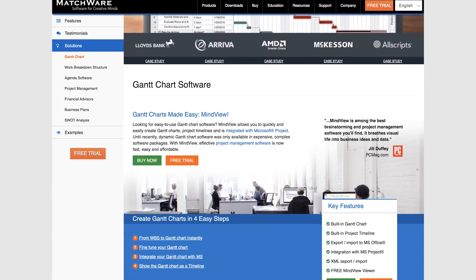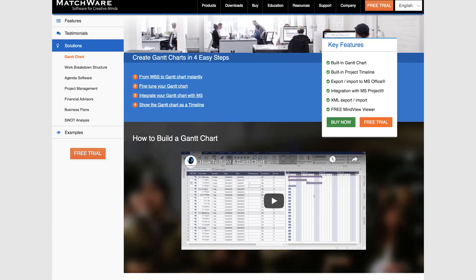Ninth is MindView. MindView is a powerful Microsoft Project alternative that boasts mind mapping features for project planning. With MindView, users have the ability to create a work breakdown structure, project timelines, and roadmaps, all without having to recreate data. Users can start by brainstorming project plans in the mind mapping view, adding scheduled information, and then switch to the built-in Gantt chart view to refine the plan.